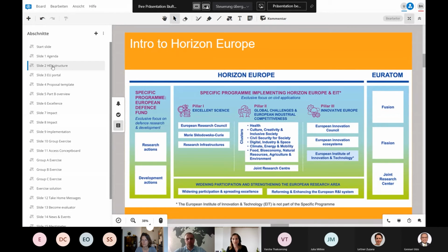And often there is not time. After 4 months of application, then you have the deadline, then it takes about 5 months until you get the evaluation results back. And if you get the go, which would be great, then the European Union also has another 3 months to sign the grant agreement with you. So I would say that about a year it takes from the detection of a call until your project can start and until you really can start developing.